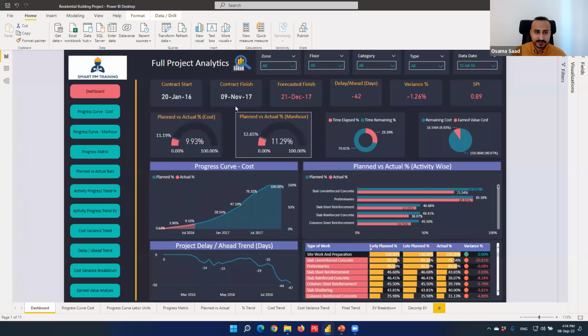So that's my dashboard. We can start with contract information: contract start, contract finish, forecasted finish as per schedule update, the delay according to the schedule update, variance percentage, SPI, planned versus actual, as per both cost and man hours, time elapsed versus time remaining percentage, remaining cost and earned value cost, progress curve, a summary progress curve, a variance analysis, planned versus actual,